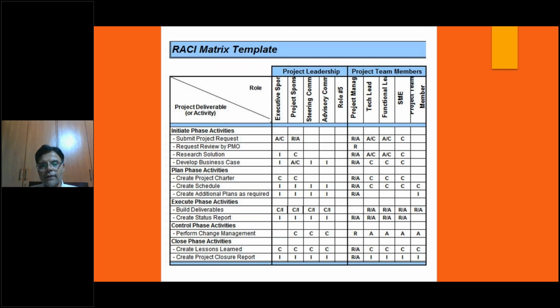who's supposed to be accountable for the business case? I say the project sponsor is accountable for the business case. I can put senior management as responsible for the business case there. I can put a project manager responsible to define the business case in case he's been entrusted by the sponsor. So there are various types, and depending on the time, there could be various roles a PM plays, and a team plays as well.